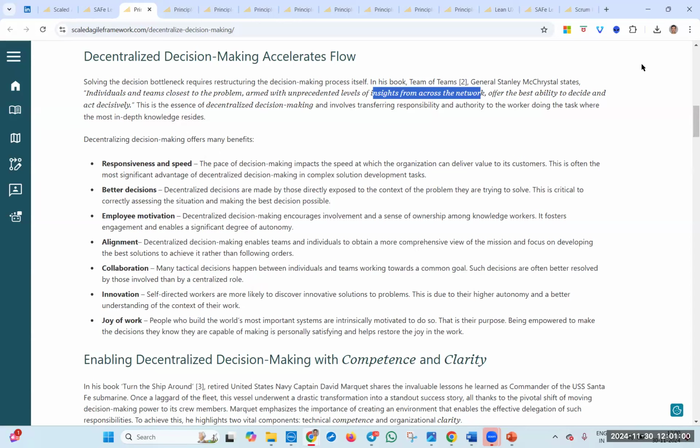So what does this mean? They might be taking the decision about the milestone, but if in case we observe there is a risk or a challenge or we won't be able to meet the deadline or the timeline, we have to pass on that information to the leadership team and get it addressed. Just because we announce the release date, we can't go ahead and do it, right?